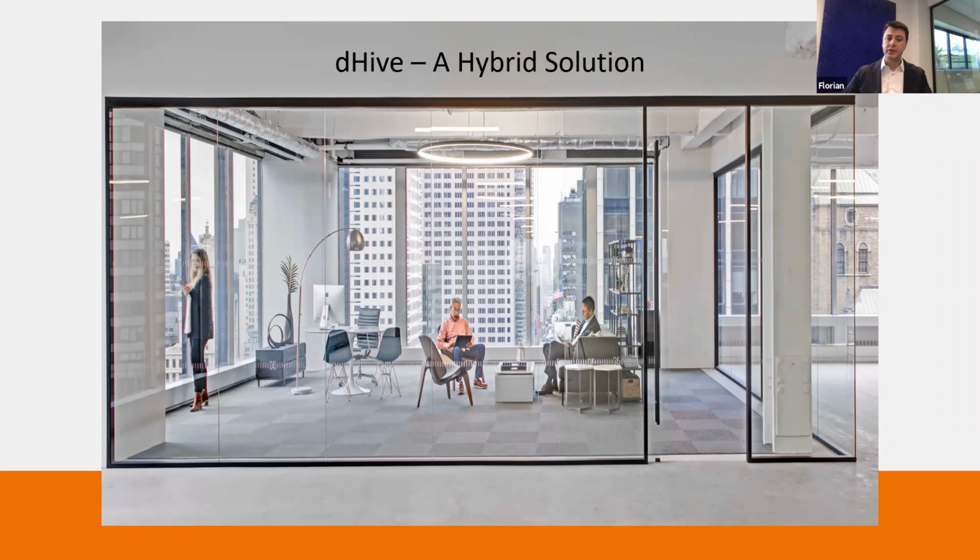When you work with DHI, you just say, well, I want a DHI glass front. There is absolutely no site preparation, and there is absolutely no hole to dimension. So that alone, in terms of process, saves about 4 to 8 weeks of coordination on the A&D side. So it significantly simplifies that process.